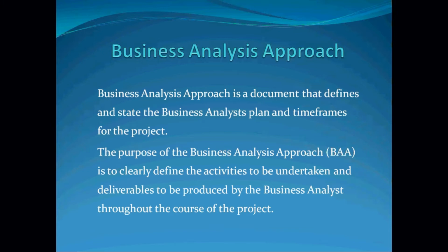It could be maybe four pages, and you have a template. Definitely the organization will have a template. You state the background information about what the project is all about, and the work stream that you are working on. For example, maybe you are working on decommission, or retention of systems or retention of data within the organization. So you need to state your work stream and the scope of the work that you're actually doing. And if you know the art of scope as well, you need to state it.